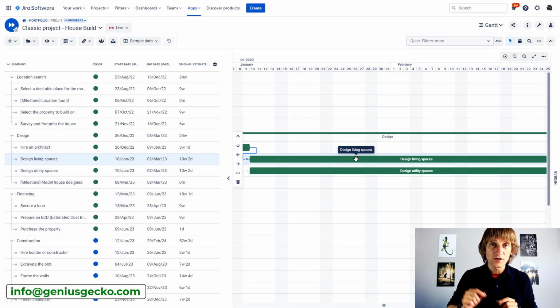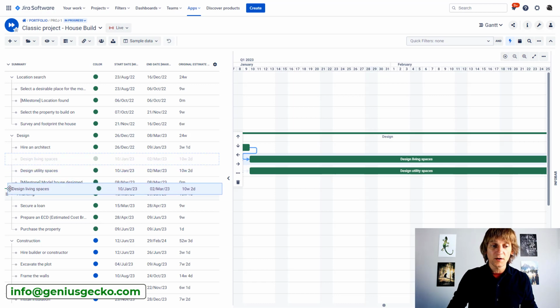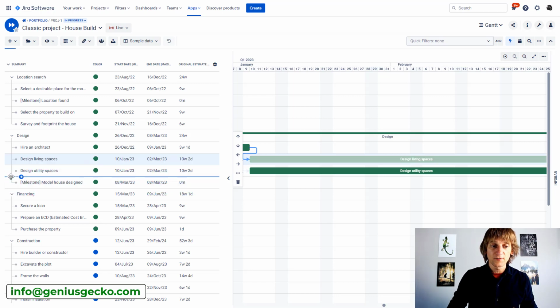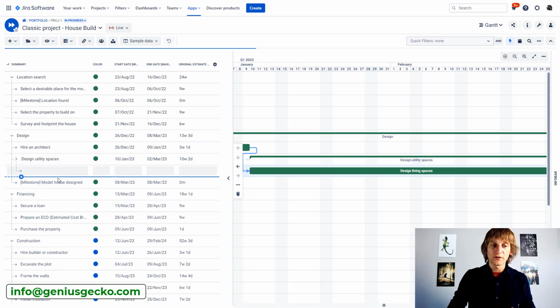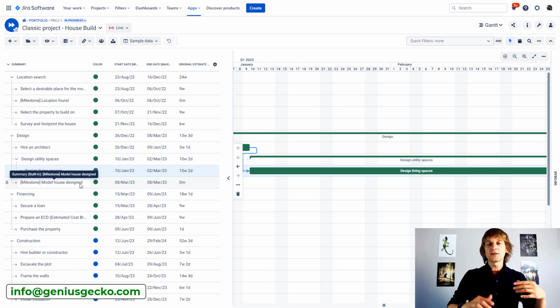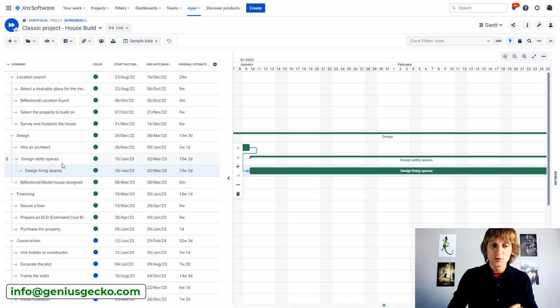But the big question is, are these users able to change the hierarchy of those tasks over here? So, make the child, put the task in a different spot inside the hierarchy, right? Like this, for example. Or maybe move a task as a child of another task like that. And the answer to this is that if automatic rules that are connected with additional Jira fields are not engaged over here, then the users will be able to do that.